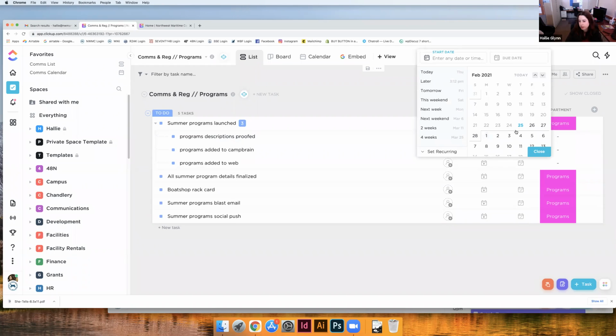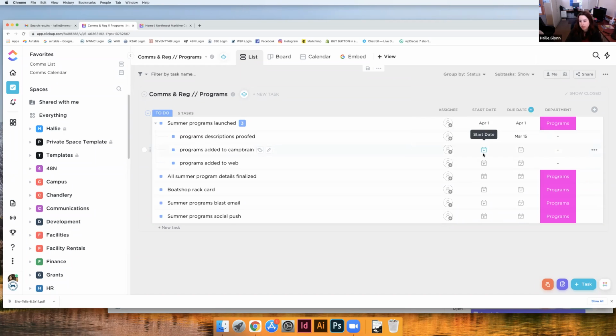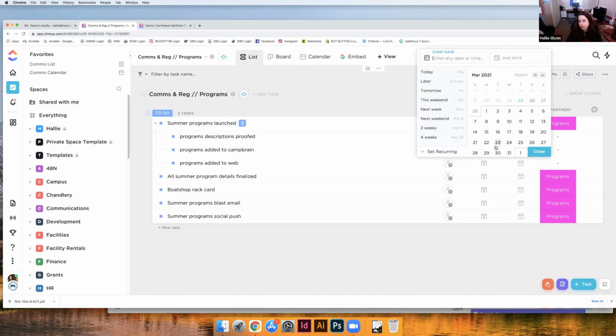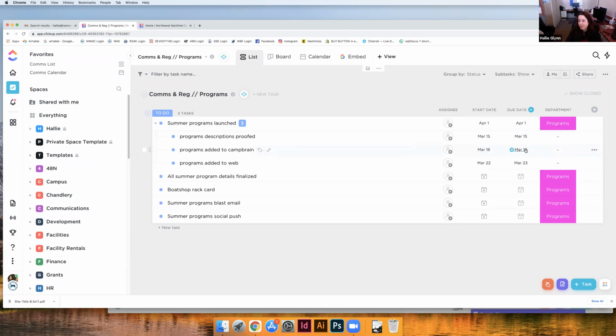Descriptions need to be proofed. I'm just going to throw in some random dates: by March 15. That's the date that's going to happen. Programs are going to be added to CampBrain March 16 through 19. And then programs are going to be added to the website, I don't know, March 22nd and 23rd. Obviously, making updates in this timeline doesn't make sense, but that's kind of the flow of how you would be adding information, start dates and due dates to a work plan in ClickUp.